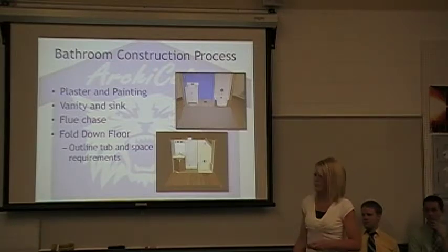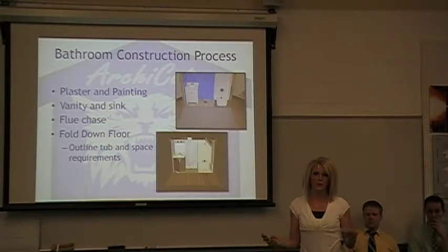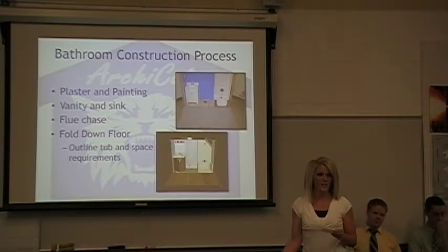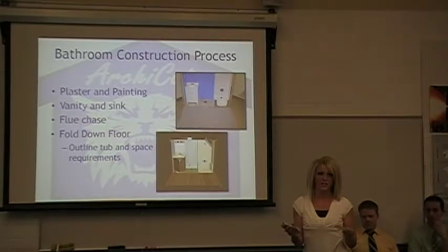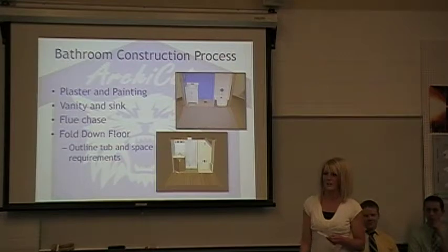And then some of the things I learned through the process were teamwork. It takes most of the things in the construction process, you have to have two people at least helping you hold things together while you nail, or just stuff like that. And I also learned that you have to think ahead. There were some things, like we wanted a recessed mirror that would go in, but we couldn't fit it in because there was a 2x4 in the way. So that's just something that I learned, that you have to think ahead all the way through the entire process before you begin.